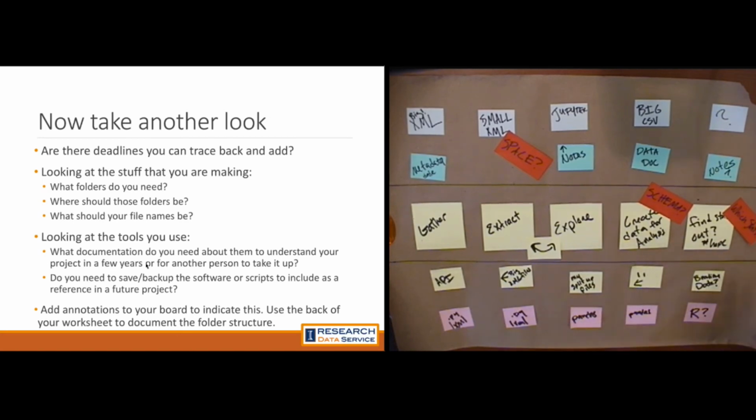We can also think about this from a timeline. So say in August, you start with this Post-it note. So we're going to start our data gathering. Hello, students, thanks for being here. Happy you're in classes, but we're really here to do research. So we're going to be starting this August 16th. We're going to be making these data files. And I know that in May, we have a deliverable due for analytics, or at least we know that given the publication process, we need to have this analytics at least started by February so that we can have something out of the door by May for that conference.